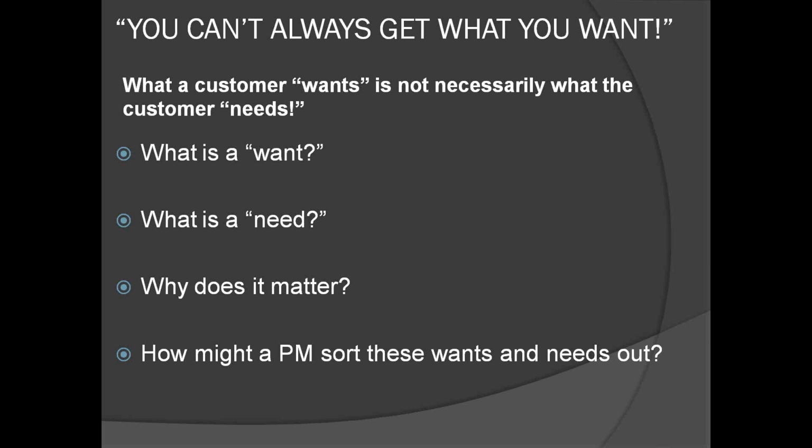So you want to identify the skills and knowledge that are required to move the project forward. You want to identify the resource area from where these skills and knowledge are going to come. You want to estimate the percentage of time that's required for the project. Just like with the grants, which is a lot of the experience we've been dealing with, you have a percentage of time that people are put onto specific grants. It's the same thing with a company. How much time am I going to take away from my employees' day-to-day activities and tasks in order to complete this project? So the right team will determine the project's success.